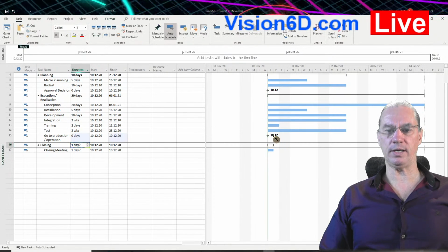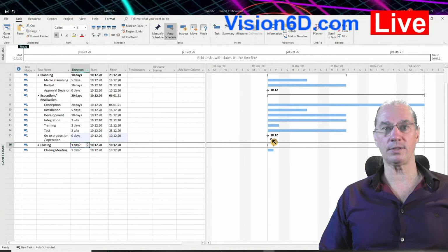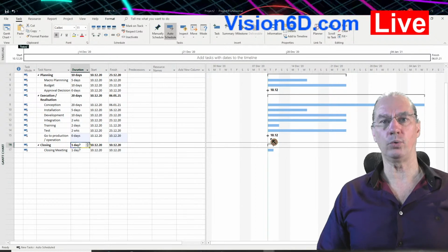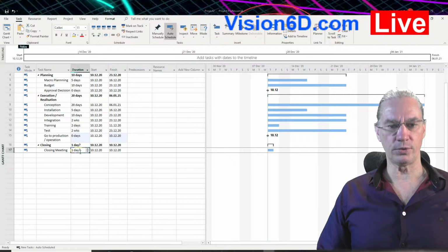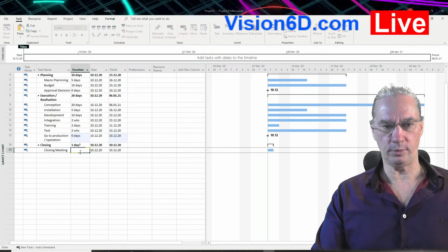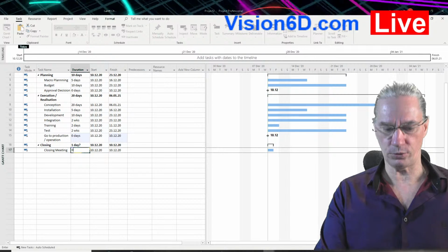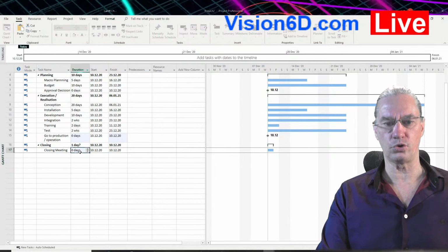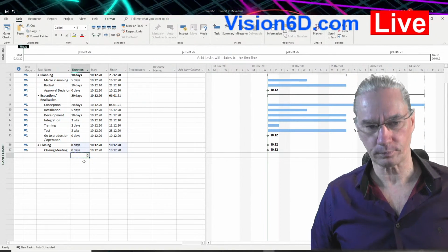So we see again appearing a diamond here, so we know that we have the milestone. It's really what we want to show into this diagram. And the closing meeting will be, we'll say, for about at the moment it's also just an event in the future, so I will set it as a milestone.